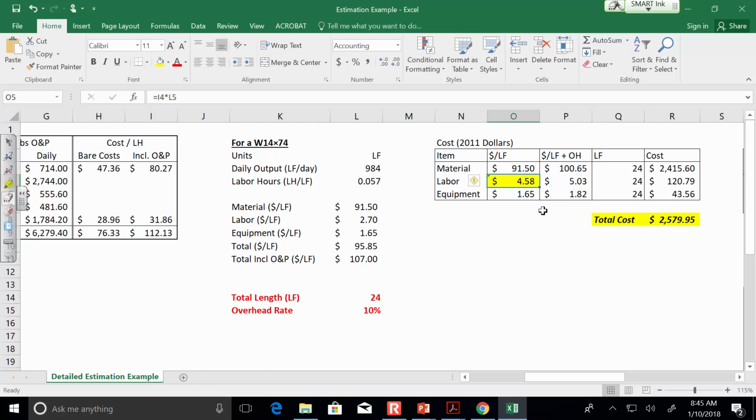Now that cost, you are sort of double counting your overhead and profit a little bit, but the way it washes out, I sort of go ahead and leave it in there because the estimate ends up being a little more conservative. Again, I'd rather slightly overestimate than underestimate. Does that make sense?